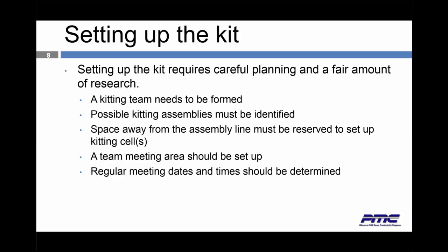Setting up the kit requires careful planning and a fair amount of research. Kitting teams need to be formed. Possible kitting assemblies need to be identified. Space away from the assembly line must be reserved to set up the kitting cells. Team meeting areas should be set up. Regular meeting dates and times should be set.